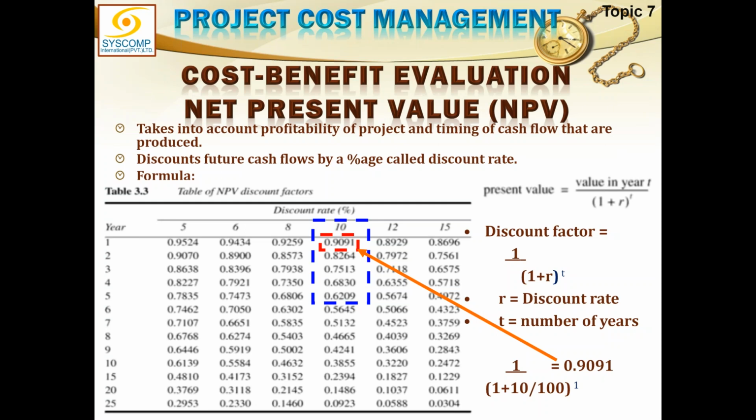For example, you promised to pay me 100,000 after 5 years, okay? And for getting those 100,000, I have to wait for 5 years and then you will give me that money, right? So what I am telling you is, please give me some money now. I will not claim 100,000 rupees after 5 years, but I need money now. So what is the present value of money you will pay me? You will pay me 62,090 rupees, because I have already applied the discounting factor, right? Exactly, the discount rate will definitely be applied.